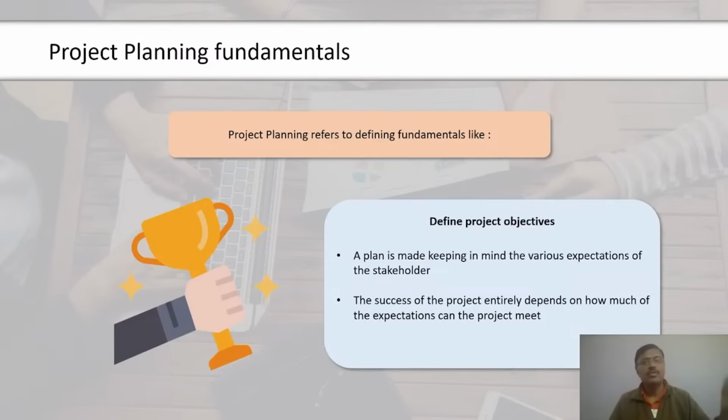Activity resource requirements is also an input to this process because resources assigned to an activity would significantly affect the activity duration. That is, the lower skilled resources would take more time than the high skilled resources. The other inputs include activity list, activity attributes, and resource breakdown structure. Resource calendars are also an input to this process. The type and skill set of resources available to the team may have an impact on the time it would take to complete the activities.